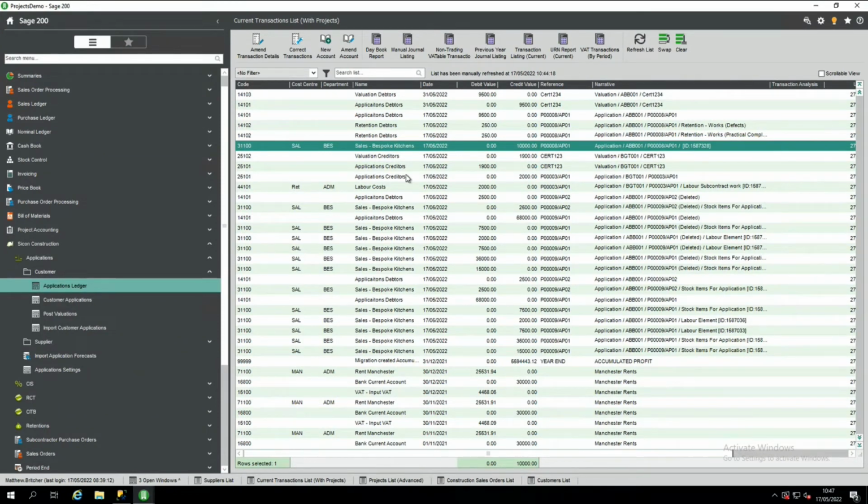Yeah, Hannah makes a valid point as well about the control accounts being separate. Tony, the sales account that Matt's highlighted at the moment is a P&L account. So we're recognizing that revenue on application and posting it to the P&L. So in the period that you recognize that application, that's going to stay on the nominal and is not going to get touched. You've recognized your revenue, so your revenue and your costs will hit in that period and give you a profit for the month.